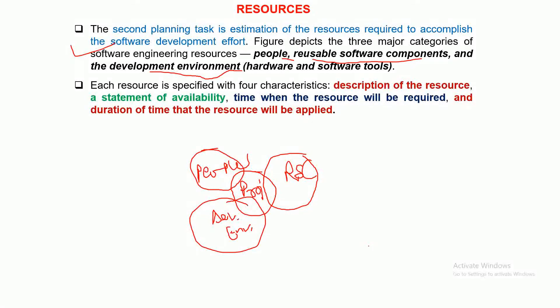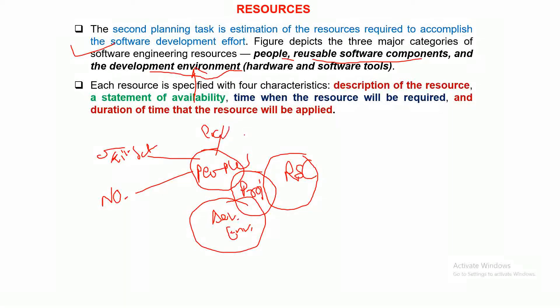Let us discuss the people resource. You need to clearly plan that for the software you are developing, you need to identify the skill set of the people required to accomplish that particular development activity. You need to identify the team size — the number of people required to accomplish the task and prepare quality software in a timely fashion. You also need to identify the location of the people.